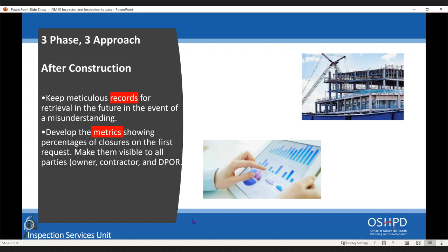What are the benefits of this? Schedule adherence. As a general contractor, if you've got good confidence that you're going to get a lot of things signed off by an existing trade, you can bring another sub on, and he's going to have confidence that he can come on hard and start work very fast. Higher quality of work. Do work once. Don't do it 3, 4, 5 times. The more times you do it, the worse that installation becomes. Minimize reinspection. If you're reinspecting work, chances are you might be up in an attic, crawling on top of ductwork. Not a pleasant place to be. Things are going to get broken. It's not the best place to be.